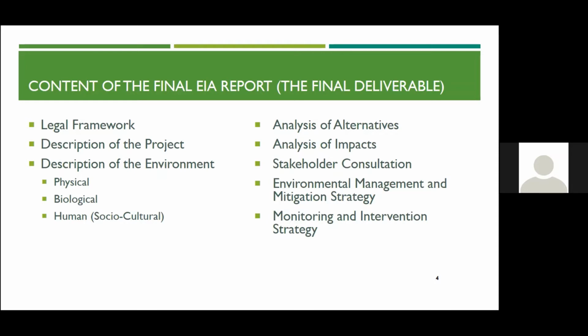The description of the project, this will provide the purpose, the justification, the details of the project, including the location, any site infrastructure, both proposed as well as existing, the project scope, emissions, potentially hazardous and non-hazardous, solid waste, liquid waste, noise emissions, air emissions, project schedule, and any staffing requirements.